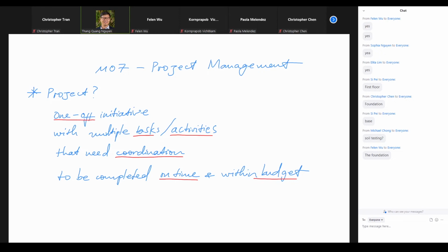Earlier, I asked you about the SSB building, right? So right before the second floor is the first floor. Then right before the first floor is a foundation, the base and the foundation, in which you have the water supply, power supply, gas supply, or the drainage, or the technical infrastructure for the whole building, right? So things are sequenced in that order so that we can effectively build up other layers of the building.